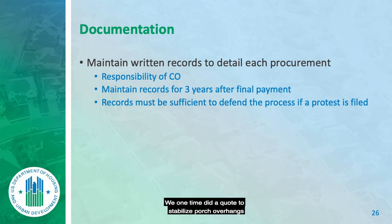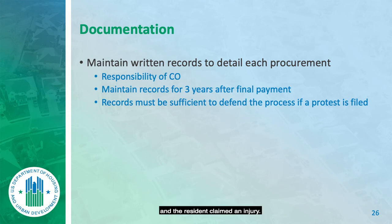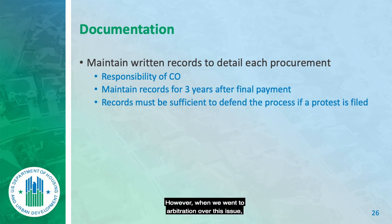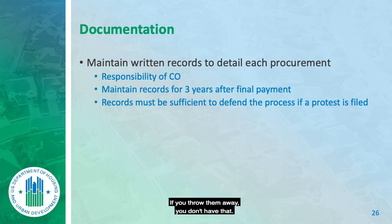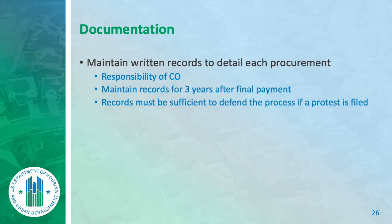We once did a quote to stabilize porch overhangs, and years later a porch fell and a resident claimed an injury. Six years later, when we went to arbitration, I had all the documentation still in the file, ready to defend our position. If you throw documents away, you don't have that protection. Never throw away construction documents — keep them forever.